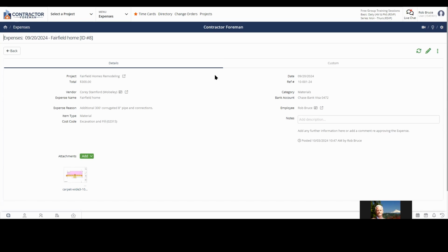You don't have that accounted for in an estimate, so that's a miscellaneous expense. It wasn't budgeted for or planned on. It was just an expense that came up. It can be materials that had to be replaced, or you ran a little bit short, things like that.